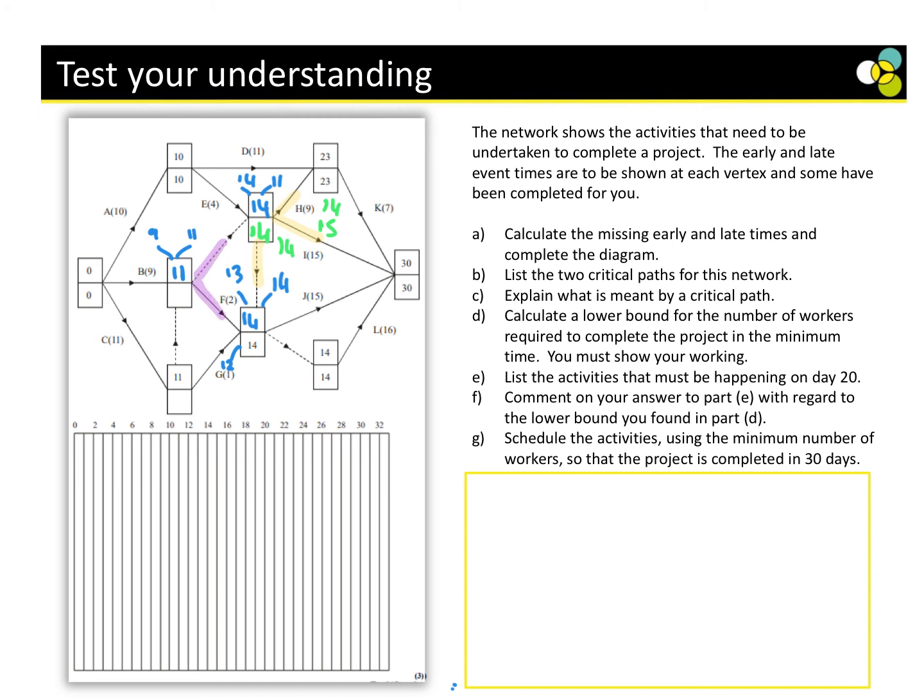What goes into B? Only these 2, right? Yes. Okay, so either 14 or 14 minus 2, which is 12. Which one am I going to choose? 12, the lowest. Brilliant. Okay, what goes into C?